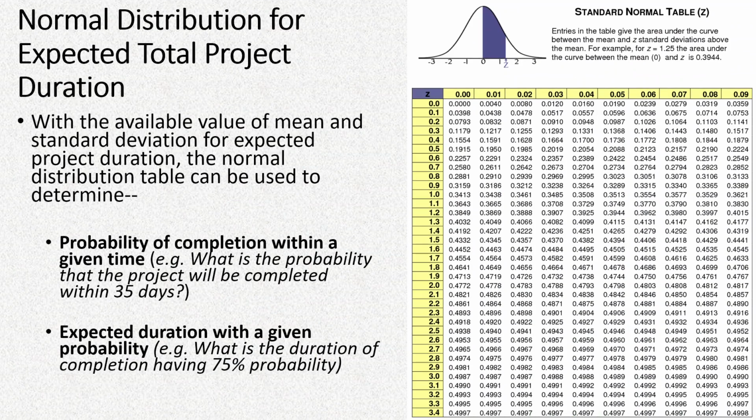we can actually use the properties of a normal distribution. We already assumed that the total duration of the project will be normally distributed, with the mean which we calculated as capital TE, the expected duration of the project, and the standard deviation. Standard deviation gives us how spread out the distribution is. Generally, most of the practical values are spread out up to 3 standard deviations, and beyond that it is quite insignificant.